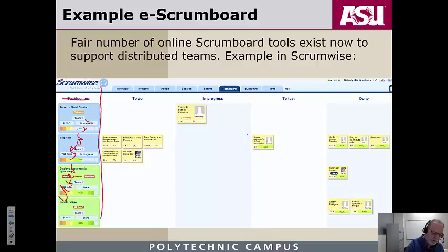All right, the user stories in blue, namely these first two, are not done. The tool color codes the ones that are not done. How do we know they're not done? Well, they still have work associated with them. The work for bug fixes, and here we just have a user story representing the amount of work we need to do for bug fixes, has 5 different ones under the to-do column.